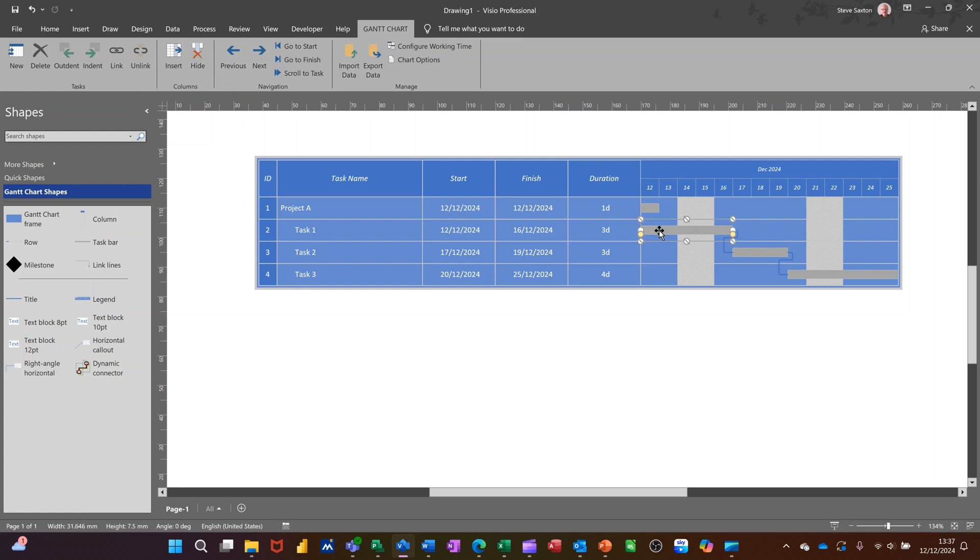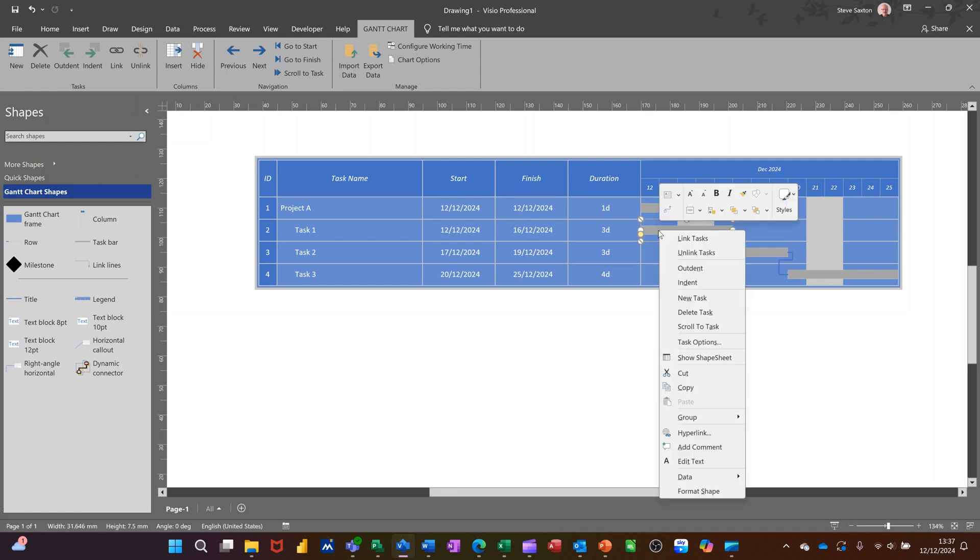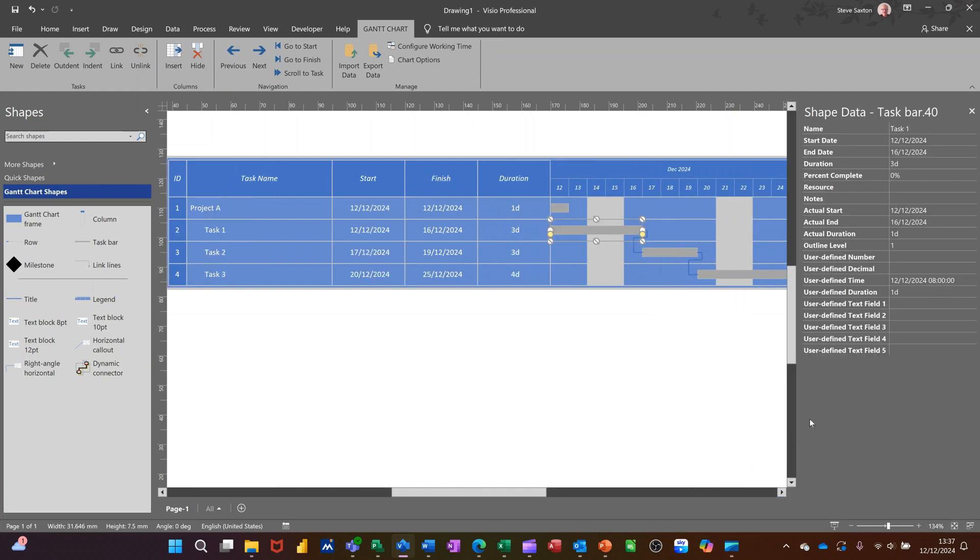Now, if I click on one of these, I'm going to what's called shape data on these shapes. You can see that there's a lot of project information in there. So you've got this percentage complete, for example. I can put something in there and it will show a little bar showing it percentage complete.